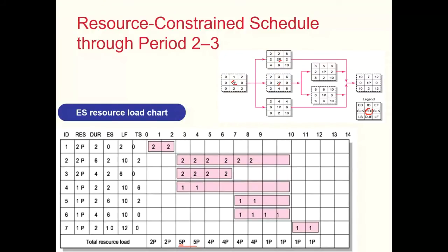So we have to decide here which activity to delay. Now, activity 3 obviously is a critical activity with no slack at all. So this has to be delivered. But activity 4 has got some slack and activity 2 has got some slack. So we have to make a decision which activity shall we prioritize. So the slack of activity 2 is shown here as 2, whereas slack of activity 4 is shown as having a 6. So 2 is lesser than 6, which means activity 2.